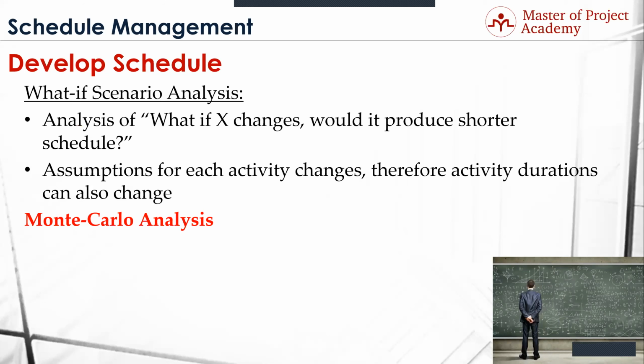And it runs a regression analysis that basically will tell you the likelihood of your project being finished in whatever estimated time that you had. And it runs the scenario thousands of times and gives many different options. So it's a pretty reliable tool for prediction of completion or prediction of schedule.